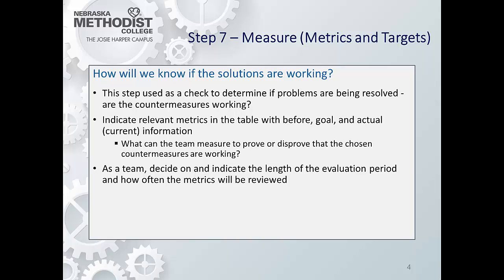As a team, make a decision as to how long you will track the chosen metrics to ensure the improvements stick. Best practice is to continue to monitor for at least 90 days after the last improvement is implemented, but in some cases you may want to monitor for an even longer period of time. Use step 7 to then study the impact of the improvements put in place and take action as needed.